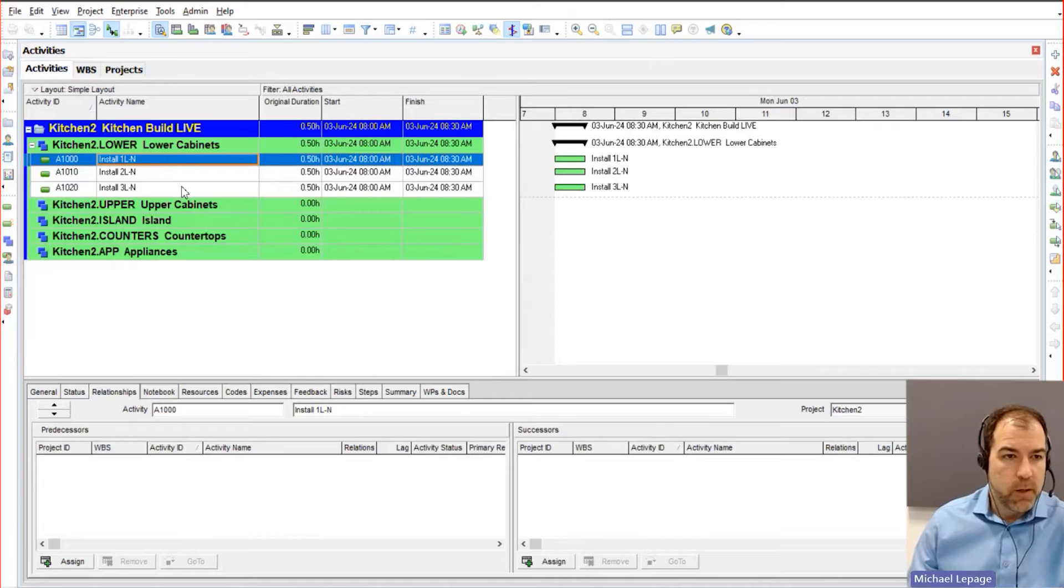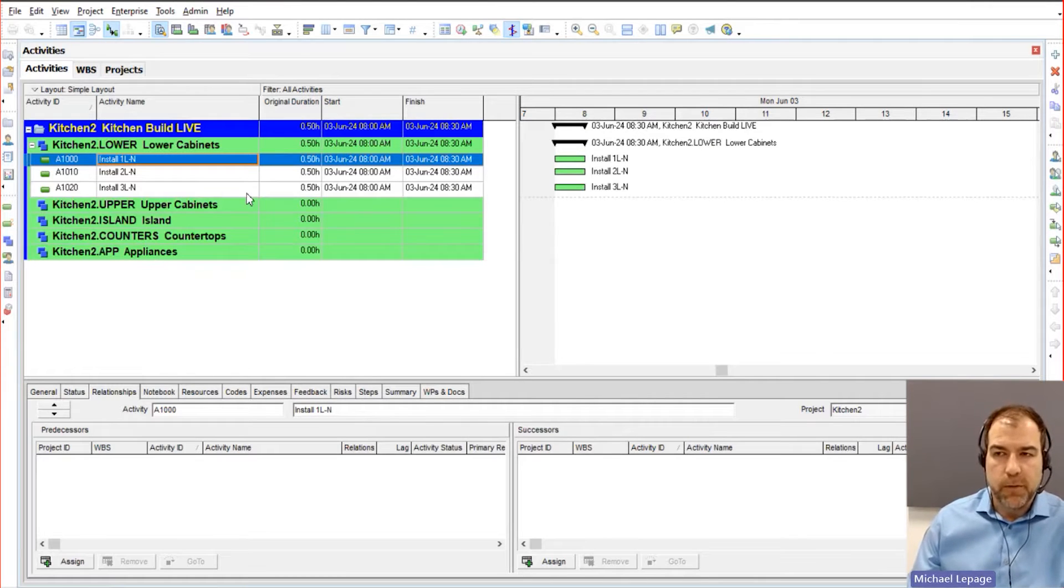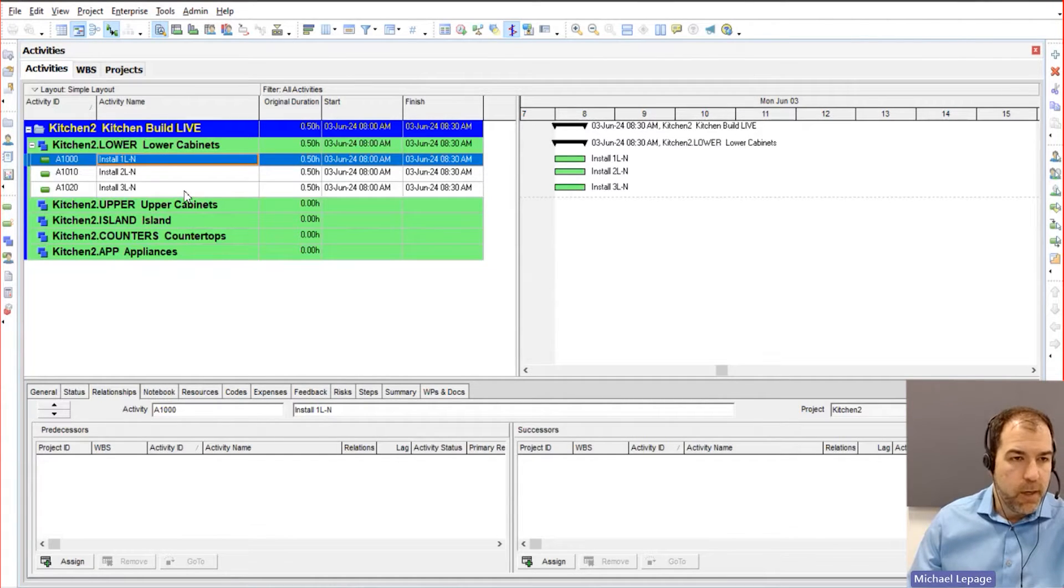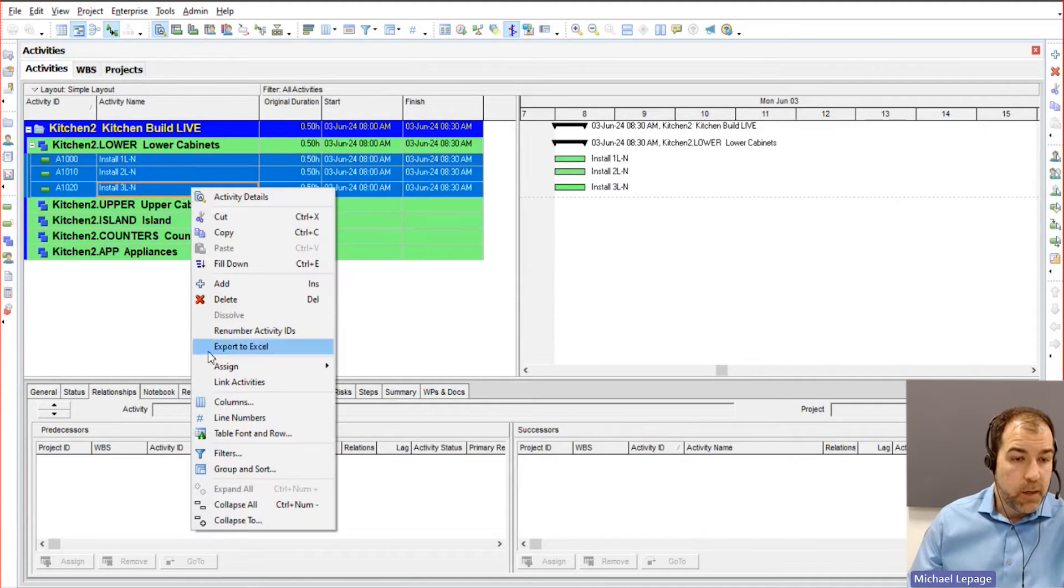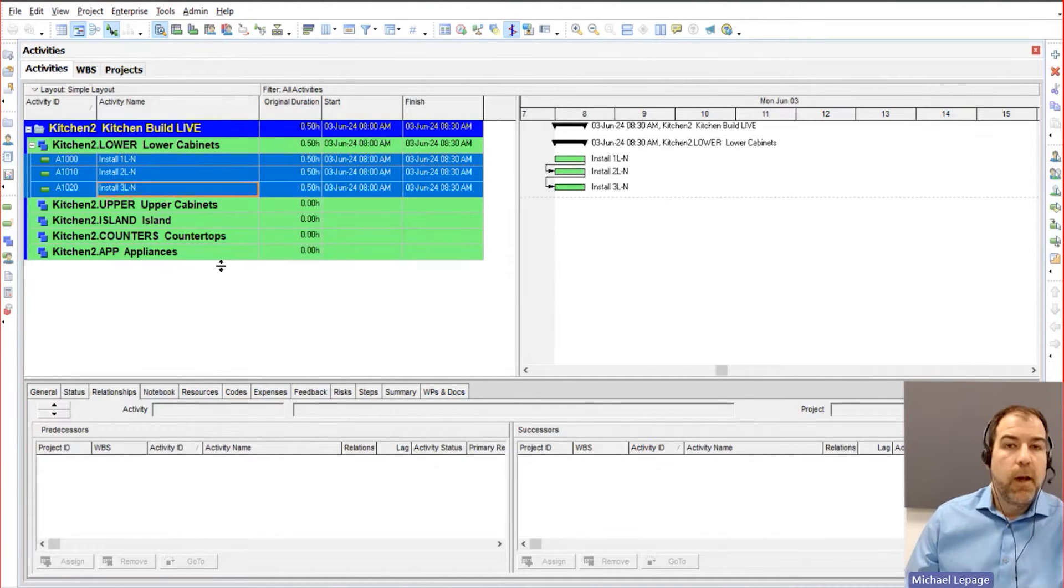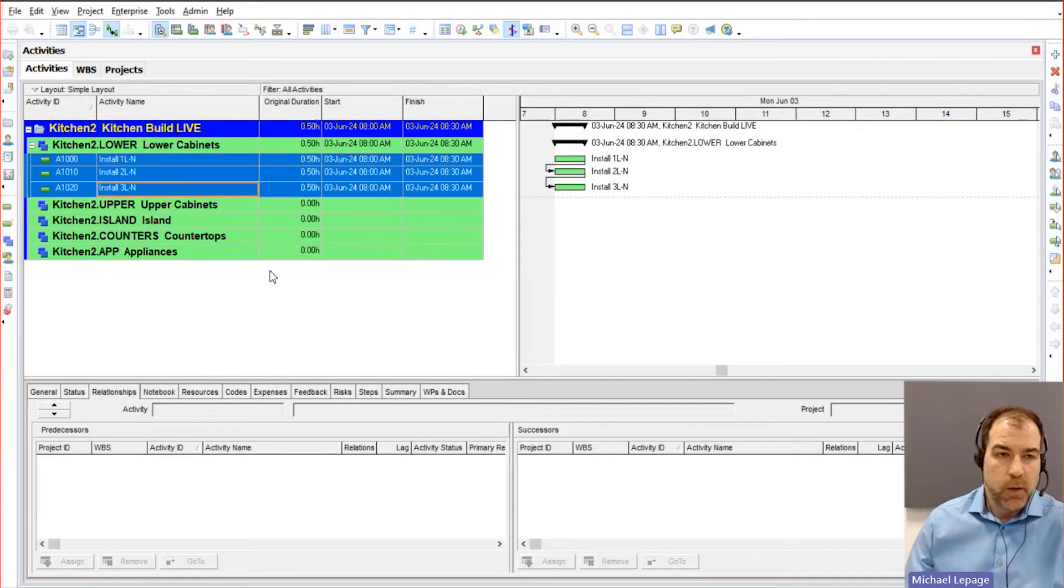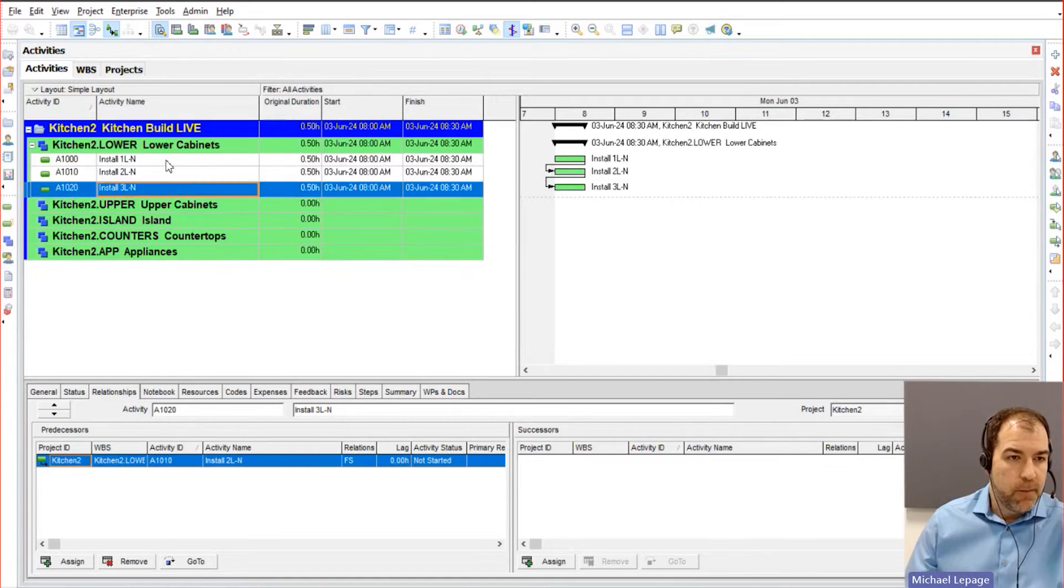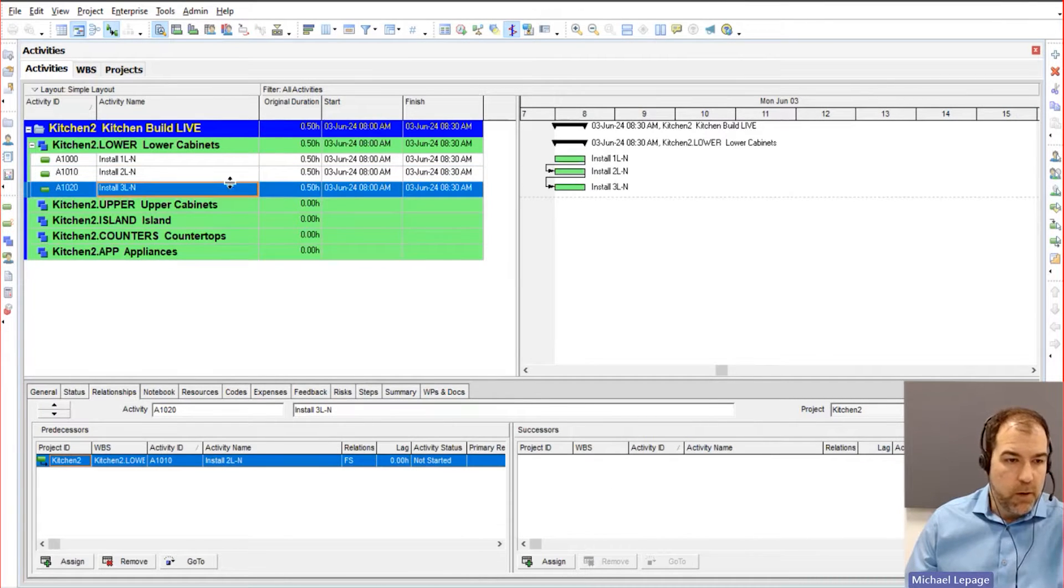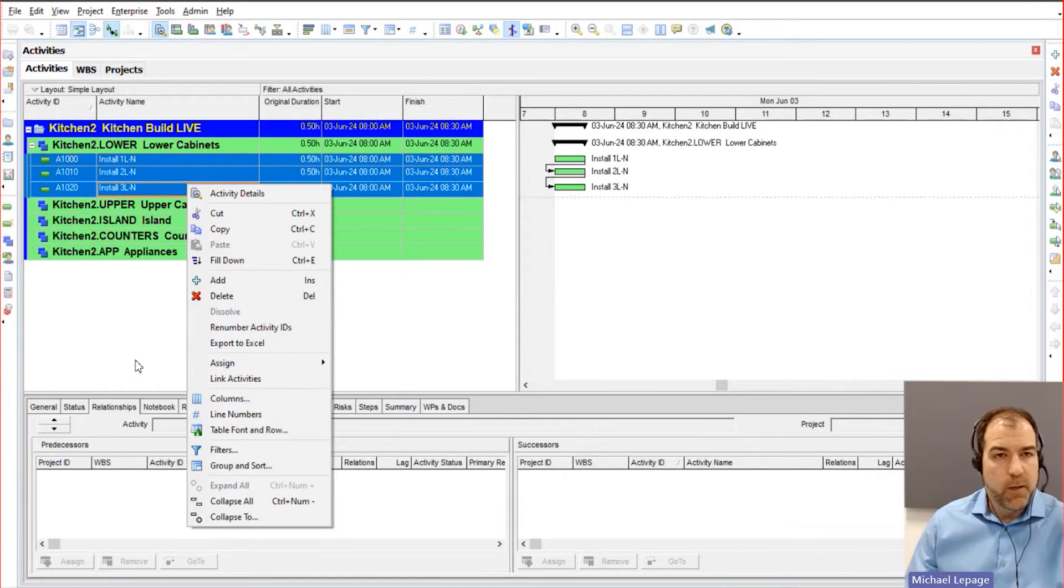So we've got three activities. Let's link them together. I like to do this. I think this is a really good practice for everybody to get the hang of. I like to highlight the first guy and then hold shift on my keyboard and highlight the last guy. So that I highlight all three like that. And then I right click and do link activities. Again, it's a shortcut. It lets me link a whole bunch of activities together all at the same time. So you can see it actually has added the relationships from the first one to the second one and the second one to the third one automatically for me. And then you can see the relationships down here. I'm on the relationships tab in the bottom half of my screen, but that's my favorite trick linking a bunch of activities, highlighting, right clicking, link.